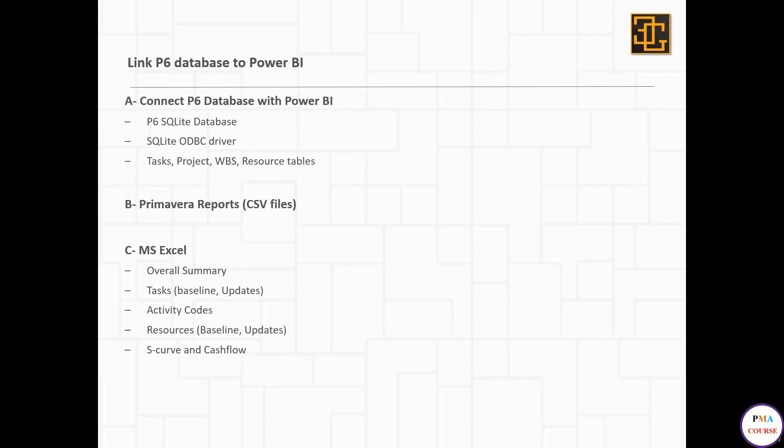I'm using only the tasks, projects, WBS, and resource tables. The biggest benefit of this method is that once you update your Primavera or add a new project, it will automatically be linked to Power BI.